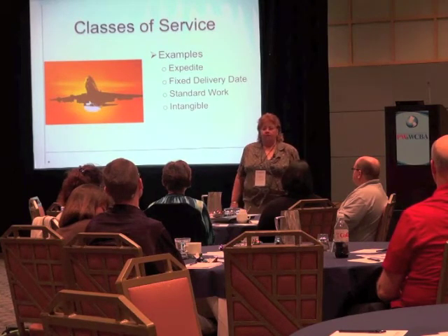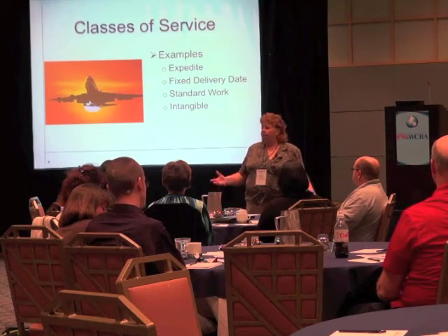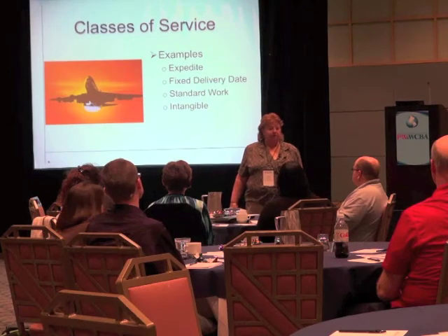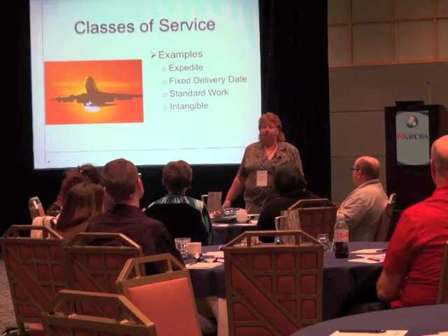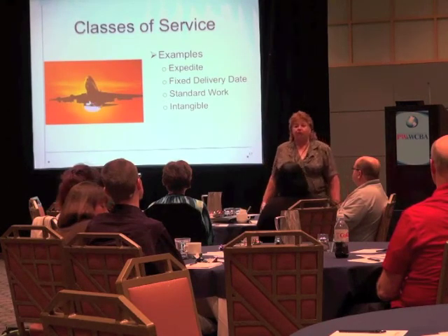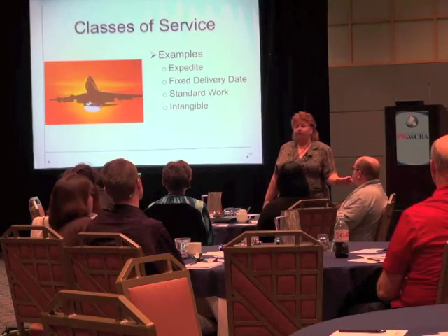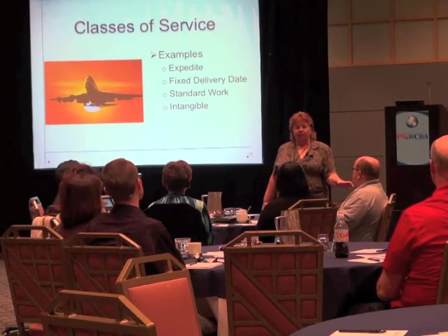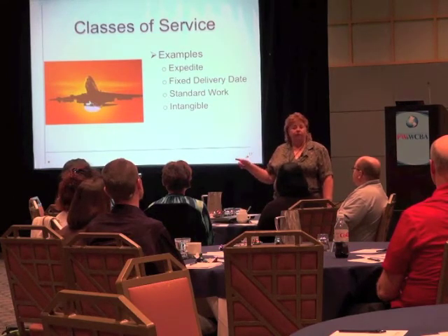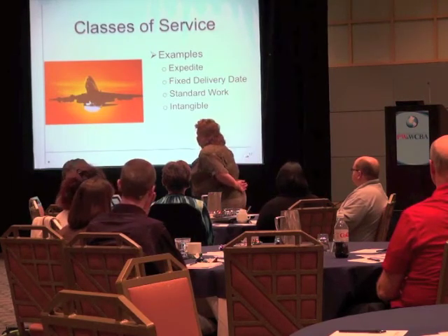I worked in an organization back in the mid-90s where a new CIO came in, looked at all of our models and said, yep, we're doing 80 cents of every dollar being spent on maintenance here. We only get to spend 20 cents on new stuff. Company was in trouble. He said, guess what? I'm flipping it over. And he literally flipped it on a dime. 20% of our energy got spent keeping the lights on. And trust me, they dimmed every now and again. Right? And we moved to 80% doing new work. It can be very impactful.